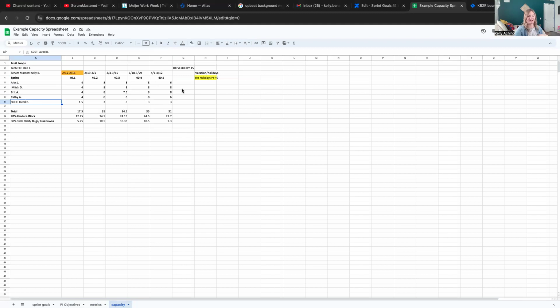of their time. We can deep dive into how I do this in another video, but for the sake of this, we're just going to be focusing on helping them plan 70% of their upcoming sprint. So I'm going to tell the team, unless you've got any tweaks or upcoming vacation the next couple weeks you want me to adjust your number, we're going to go ahead and try to load to about 21 points today.